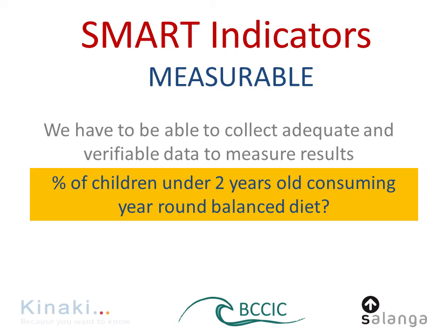So maybe instead we would want to say percentage of mothers feeding their children under 2 years old balanced diet year-round. Instead of looking at the children actually eating it, we may be looking at mothers feeding it to the children. It's a small difference, but it makes the indicator clear and measurable.